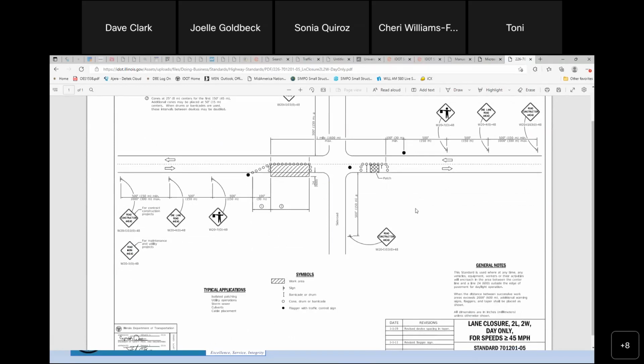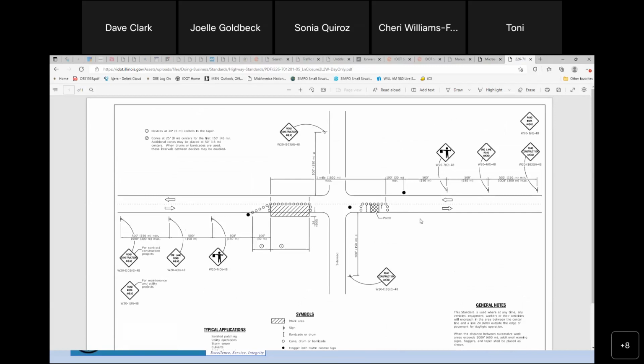So just knowing what the lay of your project is, how many side roads you have, where you're going to be working, the number of people that you need can be very significant in terms of your costs. So you want to make sure you cover the flaggers that you need. They're not going to be actually doing any work in terms of ripping out a patch, putting a patch back, finishing it, whatever it might be.